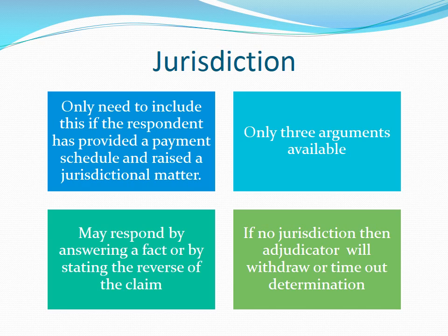A valid payment claim was served in accordance with the contract and security of payment legislation, and a payment schedule was or was not received in response. If no response, the required notice was sent to the respondent of intention to apply for adjudication. There was or was not a payment schedule served in response to that notice, and the application has been lodged in accordance with the Security of Payment Act. Whilst this section is optional, it is considered best practice to include it, and it makes it easier for the adjudicator to follow your application.